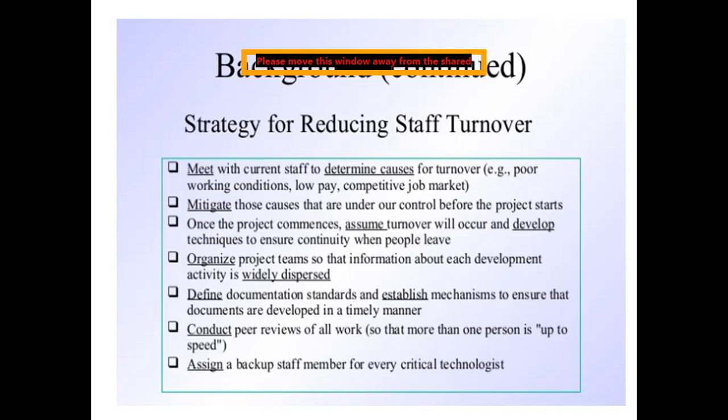Another point: assign a backup staff member for every critical technologist. Suppose there is some sort of problem, a lack or shortage of staff for a particular technical member, then we will keep a backup for that. If we have a backup for a particular technical staff member and there is a shortage, then we are going to assign the backup staff member. So it also comes under the risk.